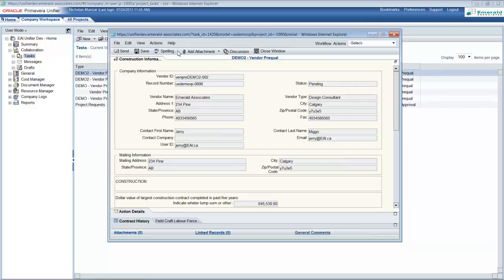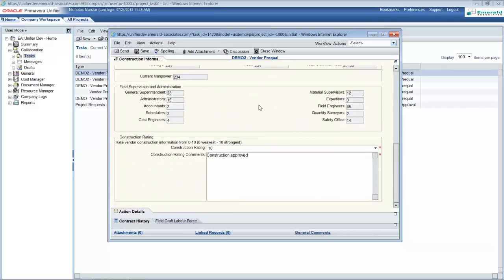The construction approval team will now look at the information in the upper form and line items and will assess the vendor's quality. Note that the construction team cannot review the information entered by the financial team, nor can they see the financial information in the upper form or line items. Here they have entered a construction rating of 10, and they will now select to send this for final approval.